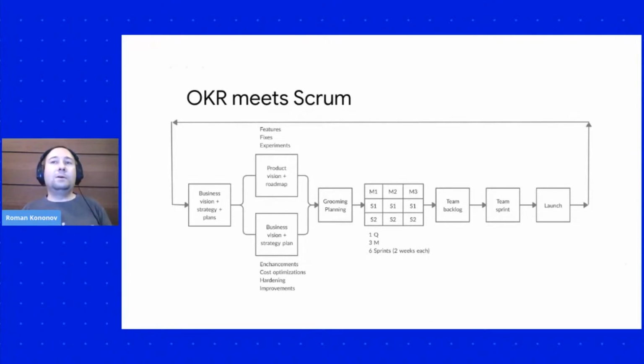So we have quarterly OKRs here. And then quarterly OKRs are split into smaller monthly goals and sprint goals. So one quarterly OKR set has 6 sprints of 2 weeks each. So we just take the objective, we see the OKRs, we decide what kind of features, tasks, code, and product we should focus on, then plan them for one quarter, split them into 6 sprints, and start working.